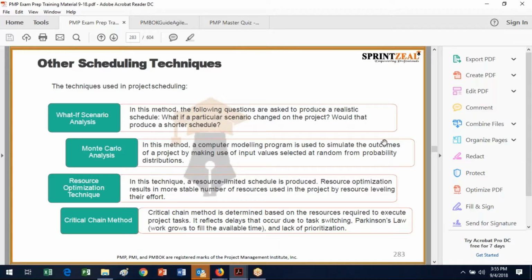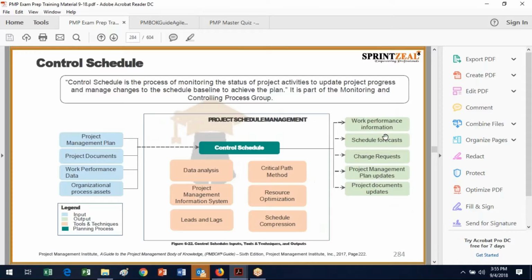And then there's the critical chain method, and that's where you might put some delays in the schedule, but you put them in such a way that nobody thinks, ooh, I'm going to take up that delay and just cool my heels or kick back, or say in a matrixed organization, oh, I'm going to go work on another project that has a hotter fire, because now I know that there's some slack built into this critical chain.